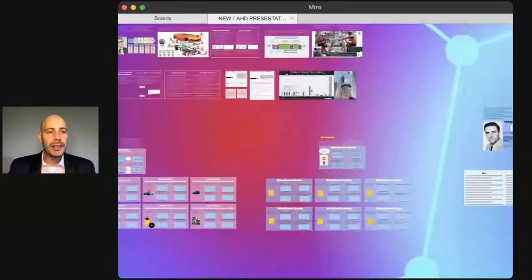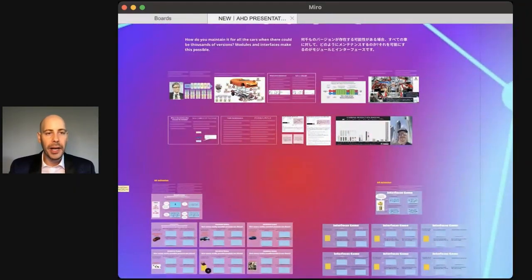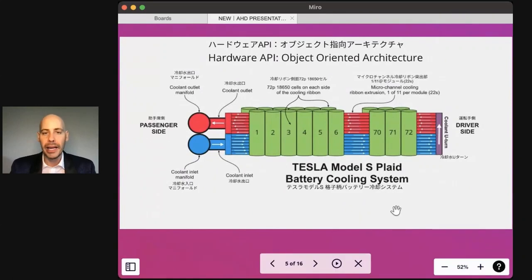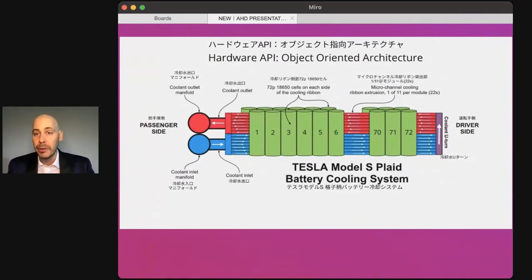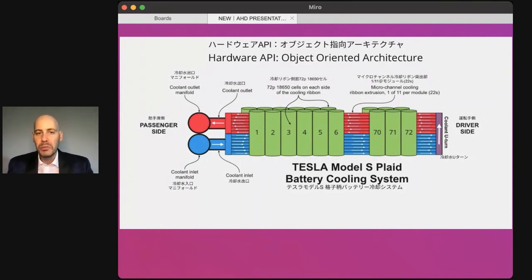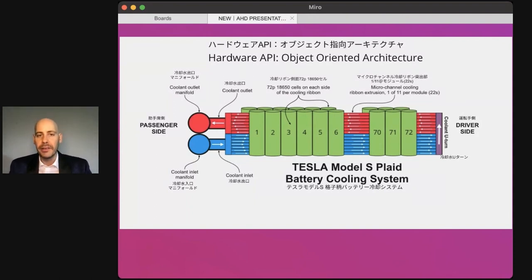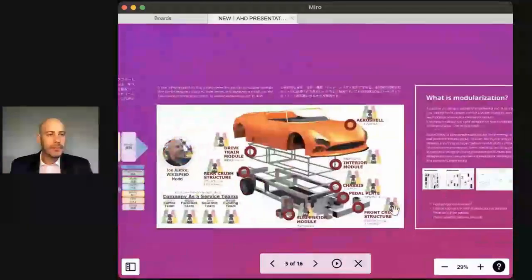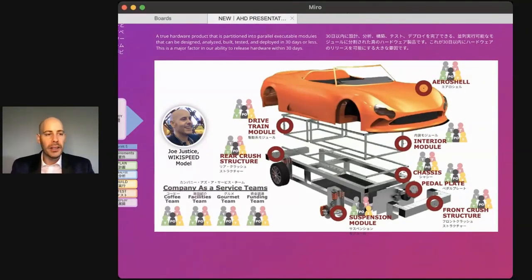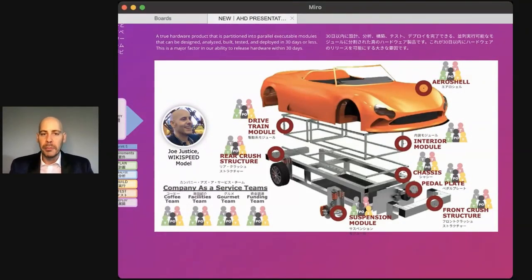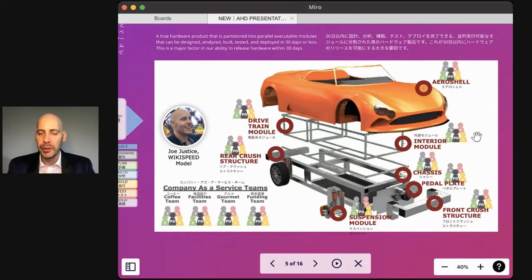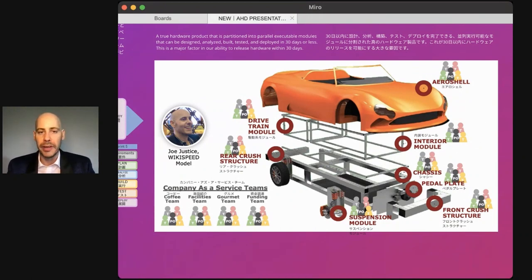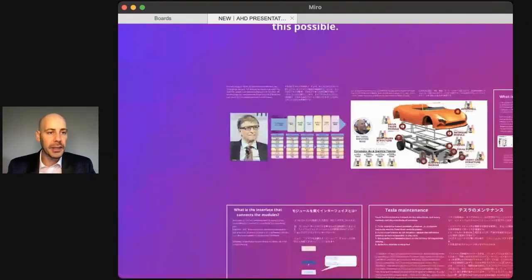What makes this parallel execution work so well is modules. Here is the actual modular diagram for the Tesla Plaid battery cooling system. You can see the inputs and outputs are labeled. This is what's important. The cooling system could change twice in a day. As long as the inputs and outputs remain constant, that new version of the battery cooling system will be compatible with all the rest of the car in production. It ends up looking like my team Wikispeed did a long time ago, where you have teams for each module working in parallel. They try to make a meaningful contribution in as short amount of time as they can. Sometimes it takes weeks. Sometimes it takes one hour. Those are released into production whenever they're finished in real time.